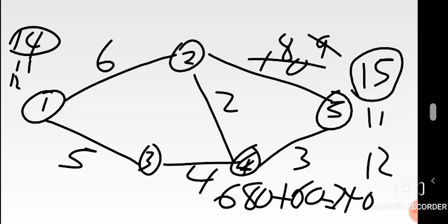Get the costs because you have now crashed to 8 days. The cost of activity 2 to 5 per day is 60. You're on 740. 740 plus 60 is what? 800. We're moving just like that. Okay. Go to the 8.